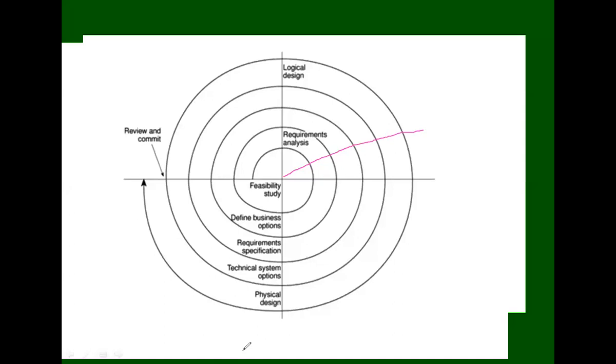Angular dimension measures the angle between two lines or three points, or the angle between the axes. So angular represents the progress so far, and radius represents the cost or expense so far.